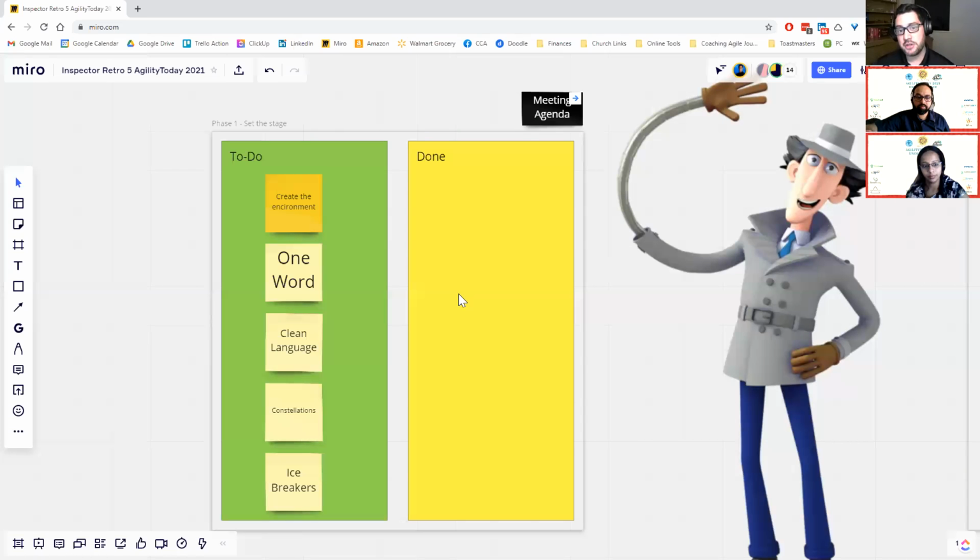And if you just jump into your retro, all right, guys, let's start, then you get lower energy, decreased satisfaction, and honestly distracted people. I've seen this, maybe you've seen it. It's the inevitable phone pops up and the person says, oh, I've got this work thing I'm working on. What that tells me is that you failed to grab their attention and transition them from work into the retrospective you're trying to do. So while I wouldn't just say do an icebreaker, you do need to spend some time at the beginning of your meeting creating the environment for success for a retro.